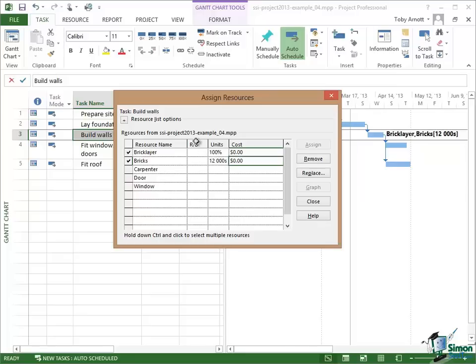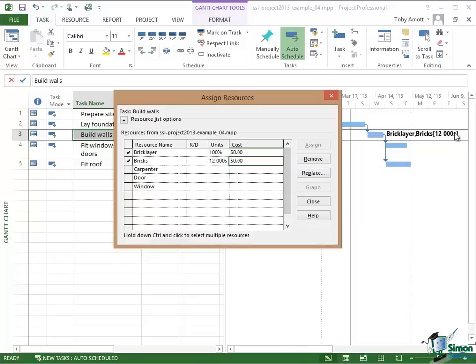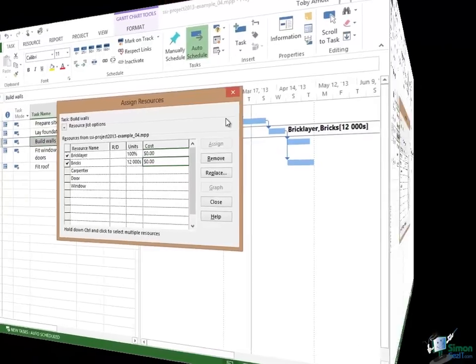Now you may be wondering what this RD column here is. The RD column is really outside the scope of this course, but basically R and D stand for Requested and Demanded. In situations particularly where resources are shared between different projects and possibly different project managers, you can demand specific resources or you can request resources. When you're doing that then this column comes into play, but that's pretty much outside the scope of this course. So I've now allocated 12,000ths of bricks. You can see on the Gantt chart there that that resource is named and I'm starting to build up a list of the resources that are needed on the Build Walls task within my housebuilding project.